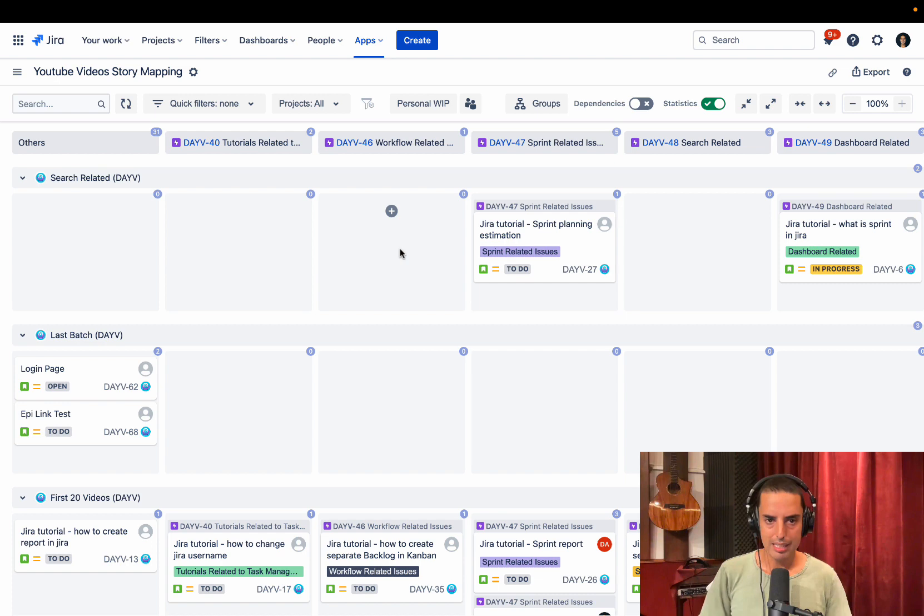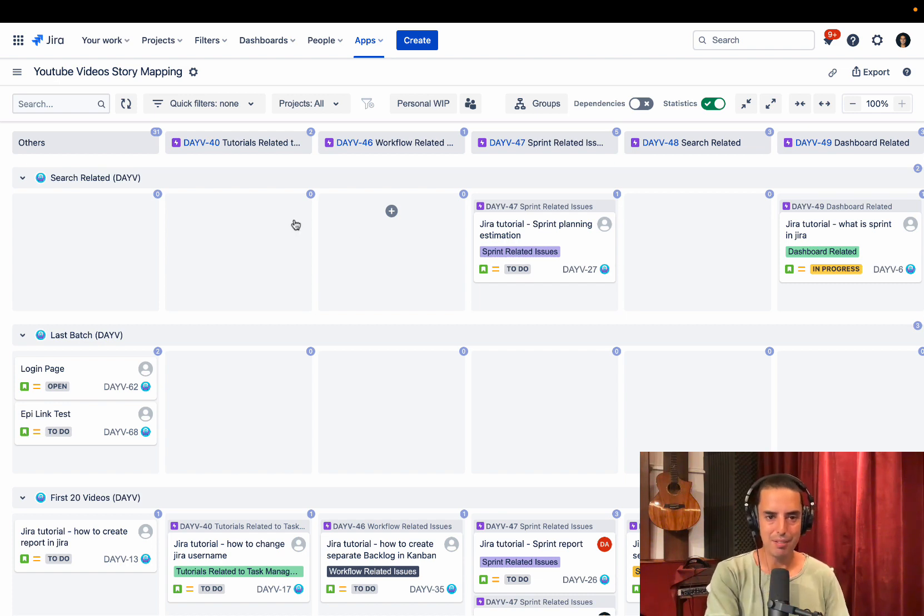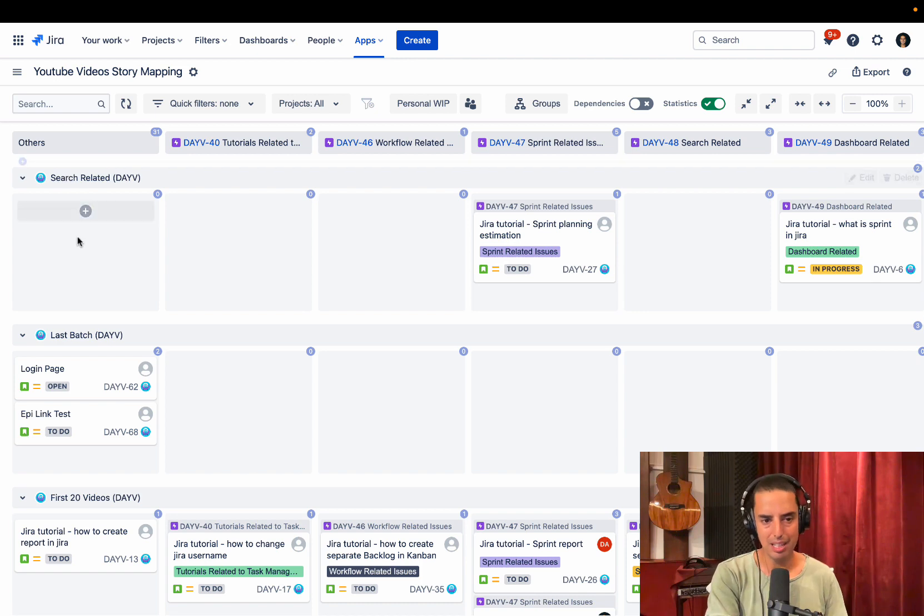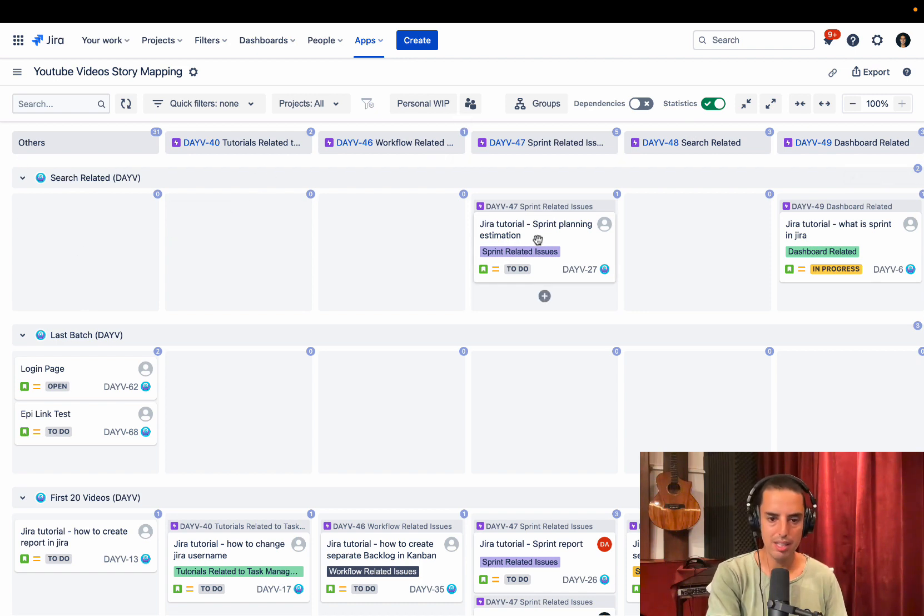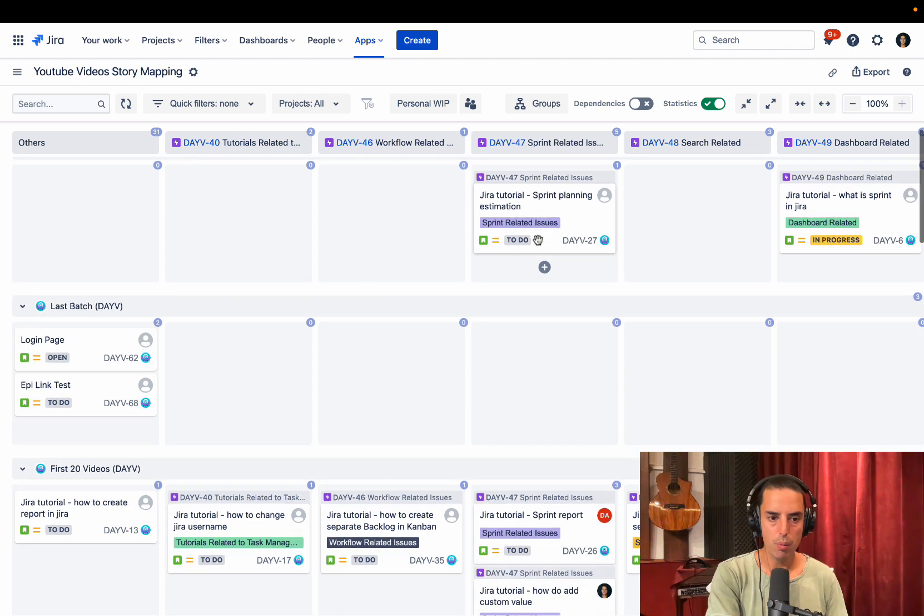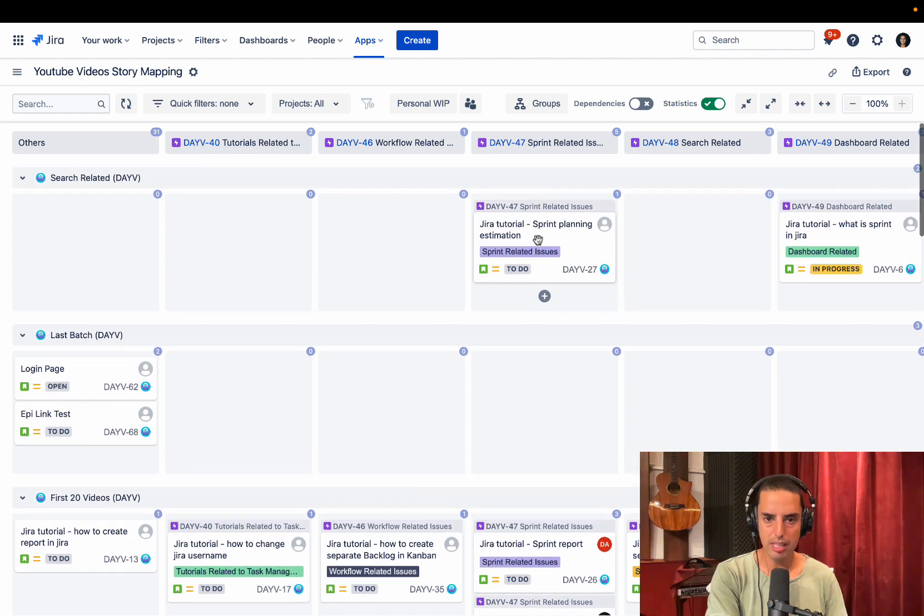And then you can go back to board. And as if it is magic, it created for us rows and columns. Our columns are fixed versions. And then rows are epics that already have issues in them. So we are all set.